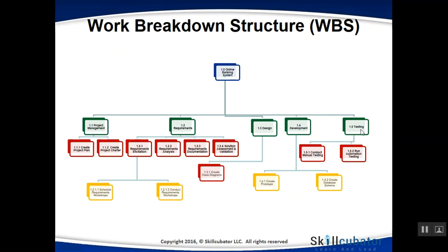Now, what's the benefit of this WBS? Kind of the same. It helps us to see the big picture, hides the complexity, and gives us more flexibility to see more details. Here we are trying to build traceability across the activities, tasks, work packages, and the deliverables. Of course, as a PM, it's a good way to see the list of activities I'll be doing or my team will be doing. So it helps in better project management, and we can also use this as an input for cost estimation.